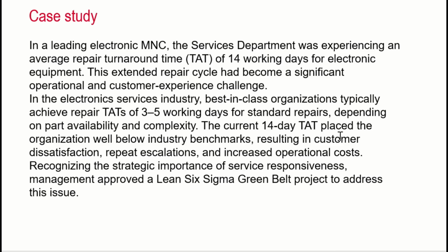So this is a case study in which we are looking at an electronic measurement company, which is an MNC. Their services department takes 14 working days to repair the electronic equipment. When they looked at the industry benchmark, their competitors were only taking 3 to 5 working days for this kind of work. But this process was taking approximately 14 days, which was way above the market standard. So they recognized that this is a very strategic project in which they want to reduce this turnaround time from 14 days to approximately 5 days. And for that, they decided to do a green belt project.